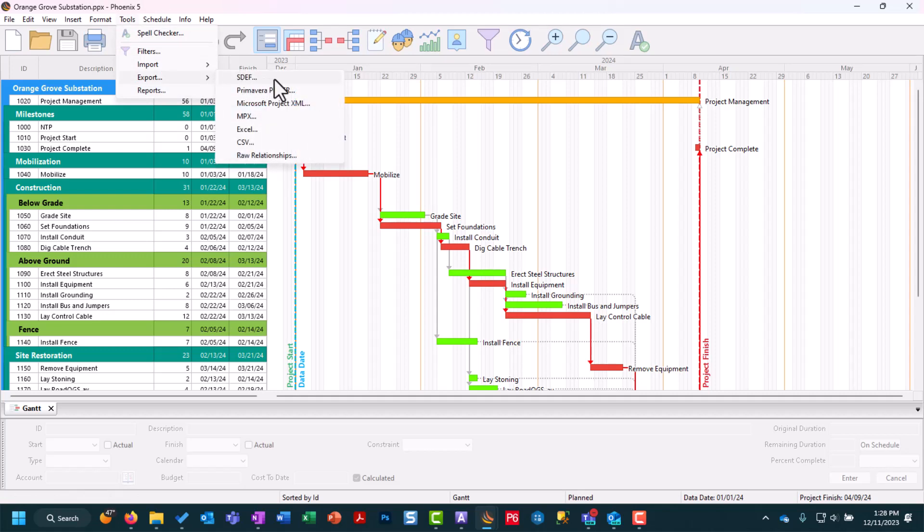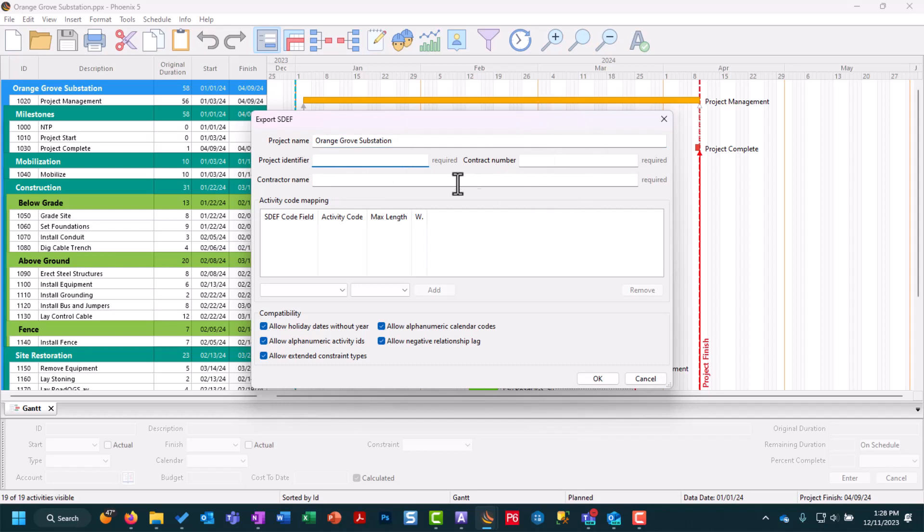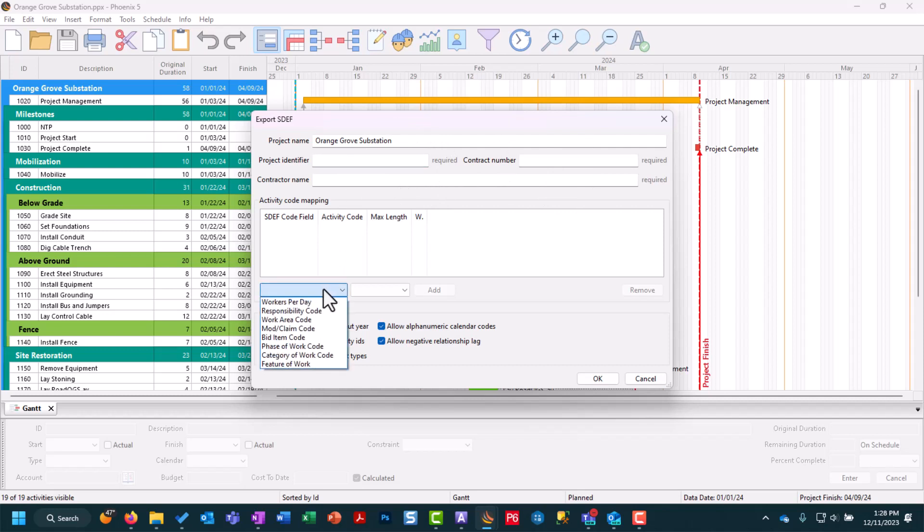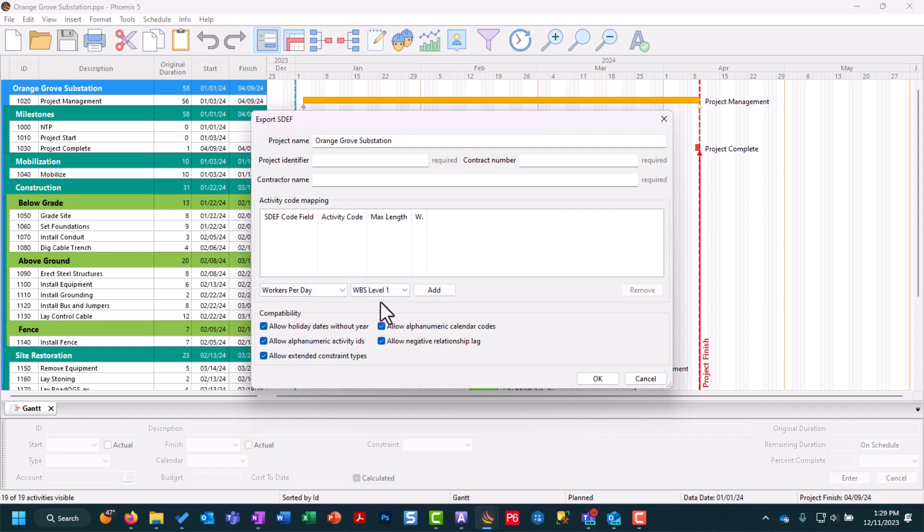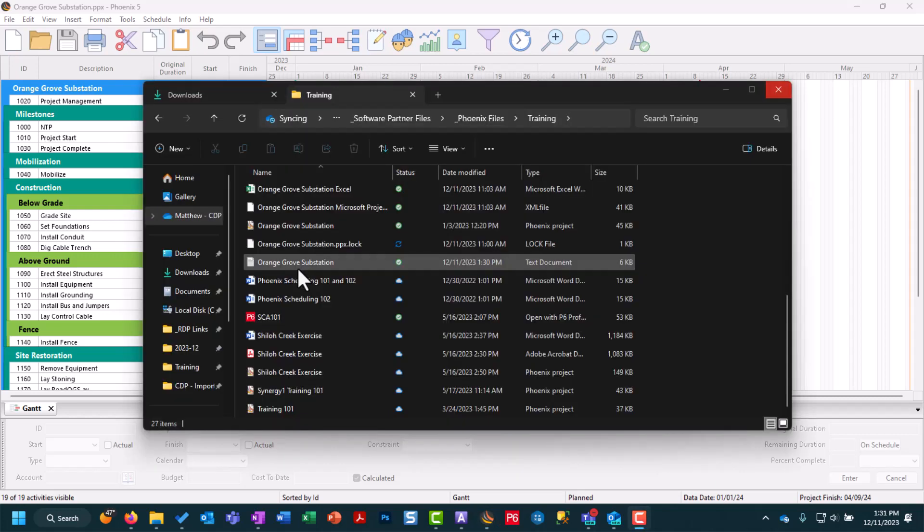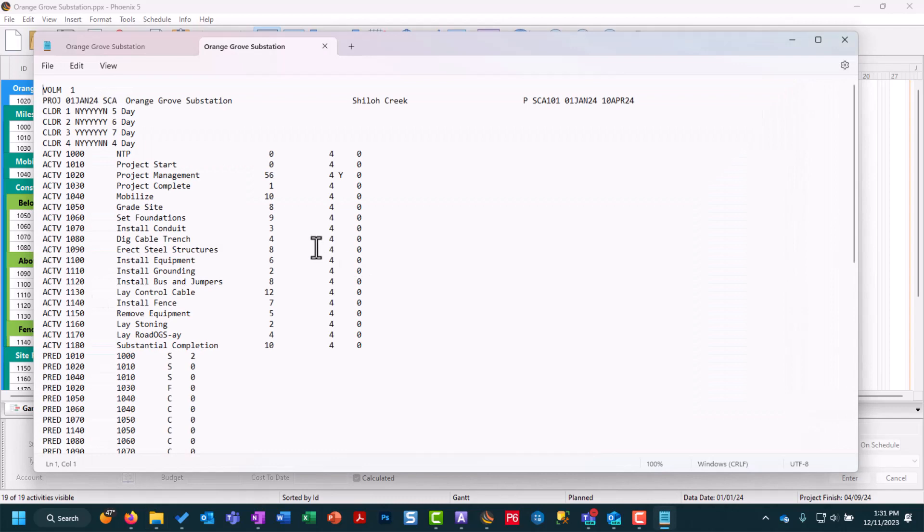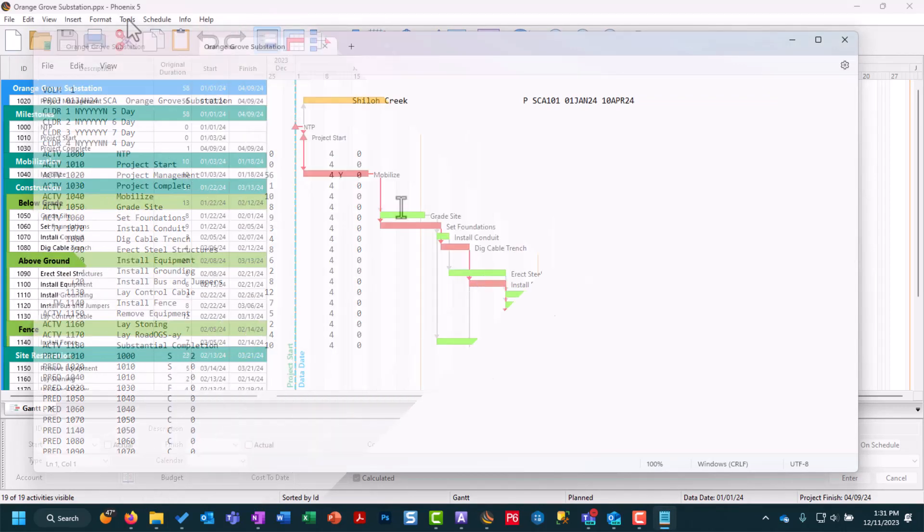For instance SDEF. When we open it up we have to fill in the required fields here: project identifier, the contract number as well as the contractor name. Then here in the middle for our activity code mapping we can use this drop down in the middle to specify an option and what WBS level to add it to. You'll see here that we now map our activity code to that SDEF code field. Once we export that file as an SDEF you'll see it populate in your Windows folder structure as a text document where we can then open it up and you see here you have your SDEF file of your Phoenix project.